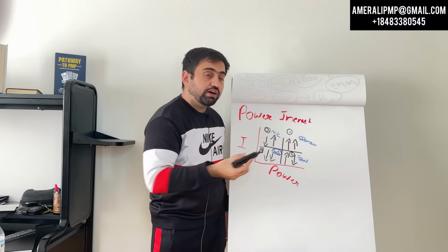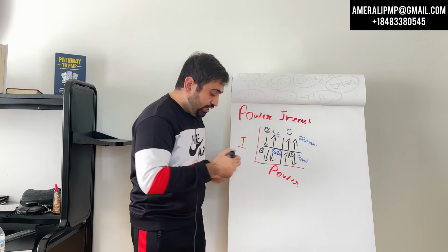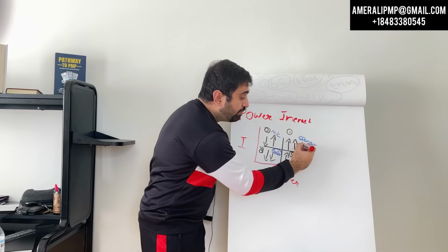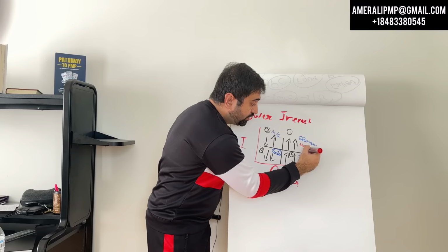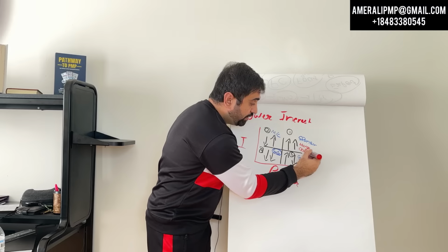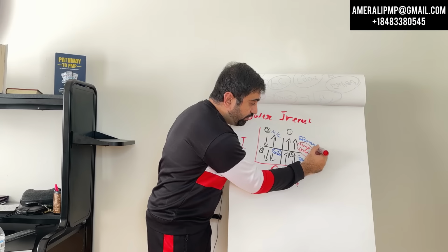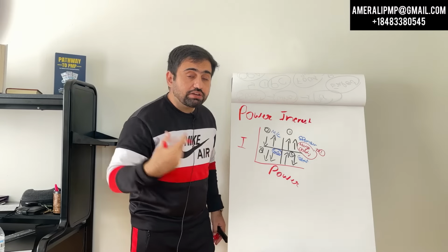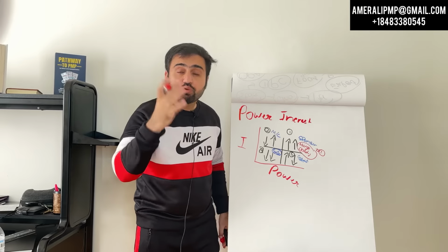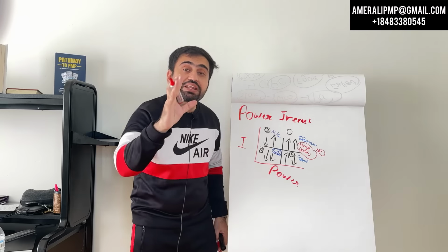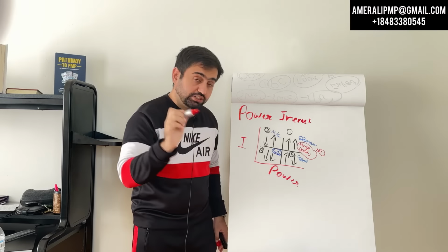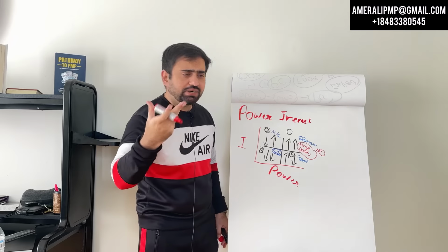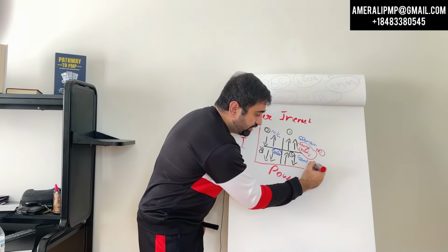Those stakeholders who have high power, high interest, let me use the red pen, I'm gonna manage them closely, work with them, understanding their requirements. They are my number one stakeholder. What they need, when they need, how they need it, working with them daily, weekly, monthly, whatever they need, work with them, manage them closely. These are the important key stakeholders.